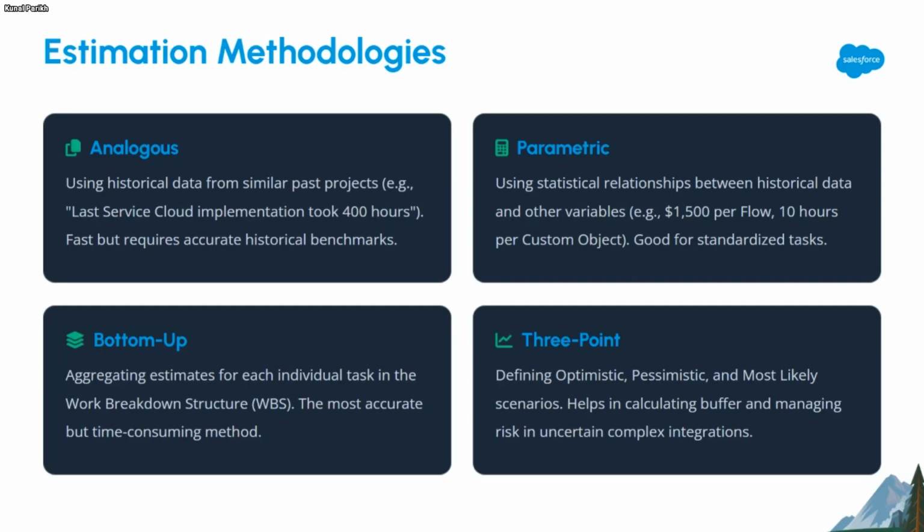You break all of that into sub buckets, smaller parts. You estimate each of them in terms of how many hours you will spend, what resources will be involved, how many resources you will require, and what timeline the customer is looking at. All of those aspects, you arrive at a calculation for each part. Basis that, you arrive at a total pricing for your entire project, and then the final pricing.